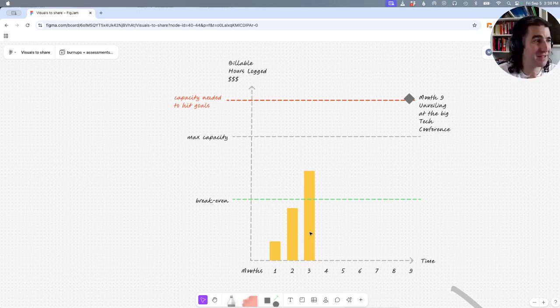And they were actually like, oh, I can make it work. I'll work overtime. But it just wasn't fair to them or to other people to expect that for the remaining time that we had to hit our goal in the project. So what we realized is we actually needed probably twice as much development time and engineering hours than we had if we were to hit the minimum milestones that the client wanted to hit.